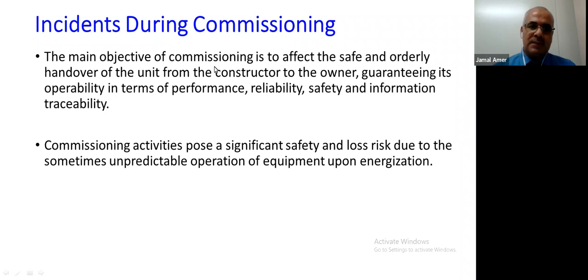through performance testing. This performance testing could continue 12 hours, 24 hours, could be 72 hours, and could continue for months, 6 months, if we have some power plant equipment, turbine equipment. So the handover could continue 6 months in this performance testing. So it is really a hazardous activity and should be controlled very well.